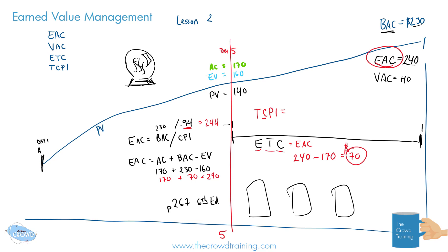So let's go with the example that we still want to try to be under budget or at budget. So using that at budget, you know, budget at completion again, and then subtracting out anything we've earned up to this point because we've already earned it, we've already gained it. But let's do a ratio then. If we're taking that budget at completion and what we've already spent, what is that ratio going to be? So we're looking at what we've earned and what we've spent to earn it, comparing it to, as you see here, the BAC of where we want to be at the end of the project. So in this case, we have 230.